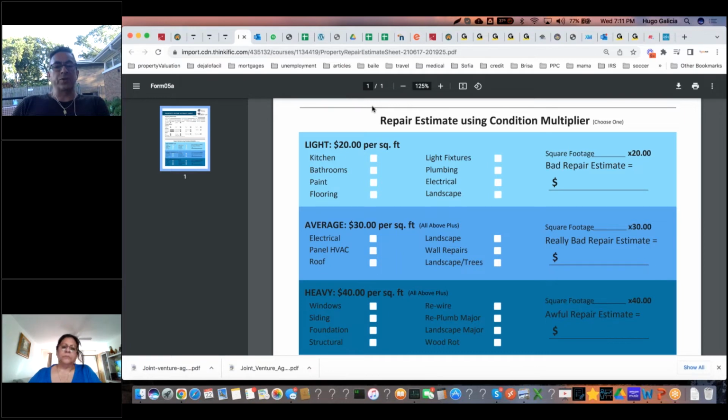Now, if you start touching the exterior, you might hit 2 months, right? If you start doing siding, fascia, soffit, gutters, garage, then you're going to hit 2 or 2.5 months, depending on how much you are doing on the exterior. If you're taking longer than that, that's a red flag. You need to work with dedicated contractors who are motivated and incentivized by completing the project so they get paid.